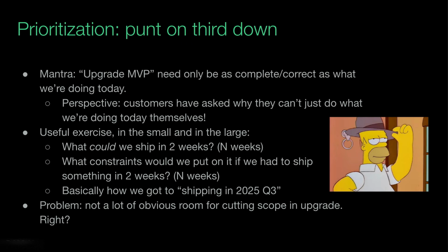Because we didn't sit down and say, how long is it going to be before we can ship upgrade? That's what we're going to commit to. Well, we actually just said we are committing to shipping update in 12 months. We said that about 12 months ago or 15 months ago or something like that. And we made decisions to make that possible along the way. And I think that is really helpful.